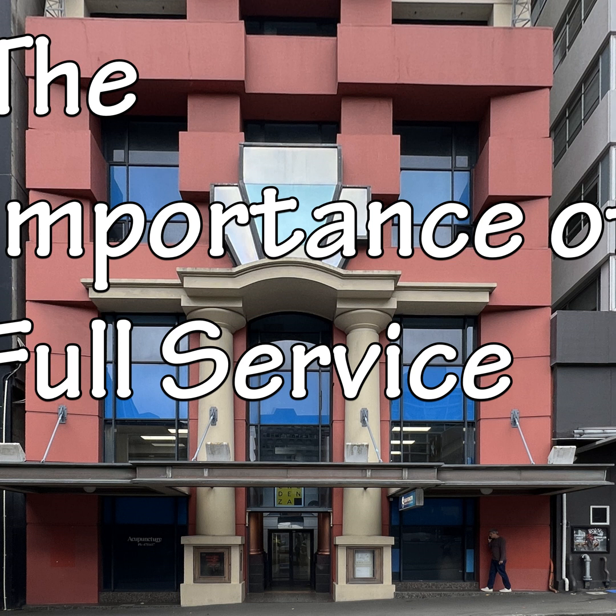I'm a real firm believer that you should, as a designer, always ask for full service, because you can administer the contract, certify the payments, sign the certificates, certify practical completion, the defects liability period, all of that stuff for the client, keeping in mind that you're working for the client in all those situations.